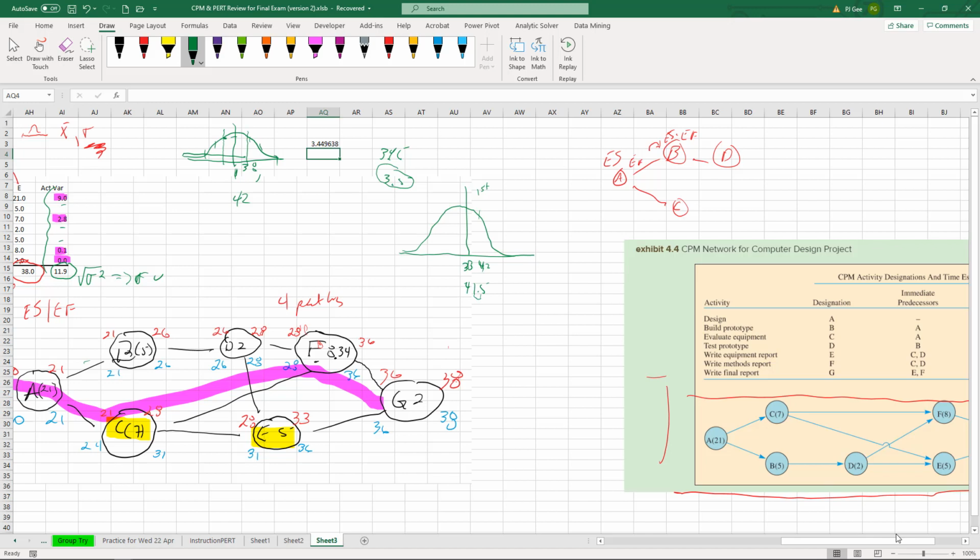Well, it's a little bit more than 41.5. If 41.5 is one standard deviation above, this is how we're going to use geometry all day long. We know 68% lies between here, which means 32% is outside, split across the two sides.